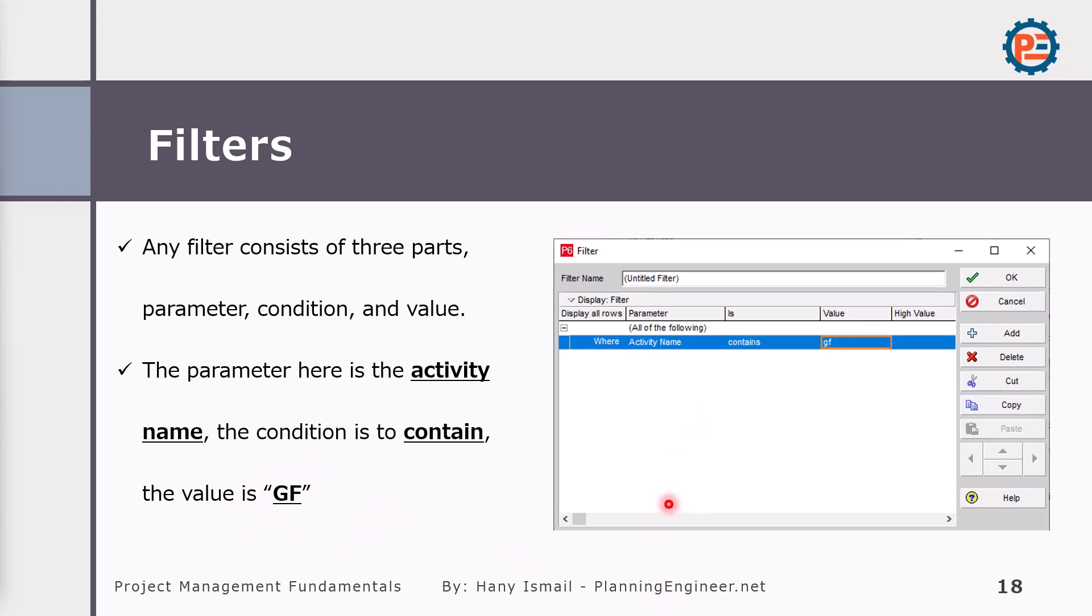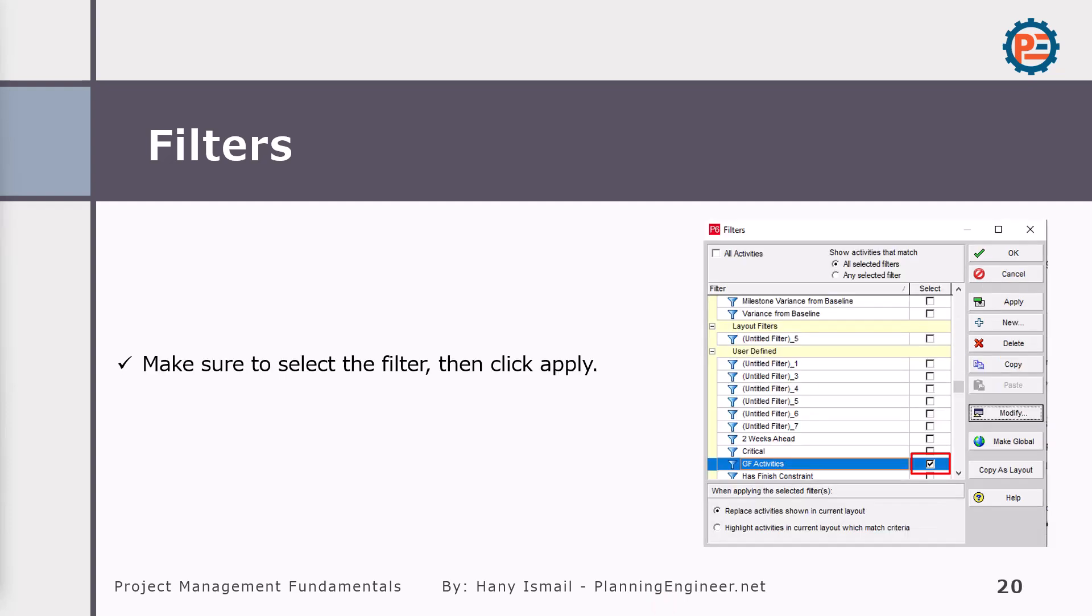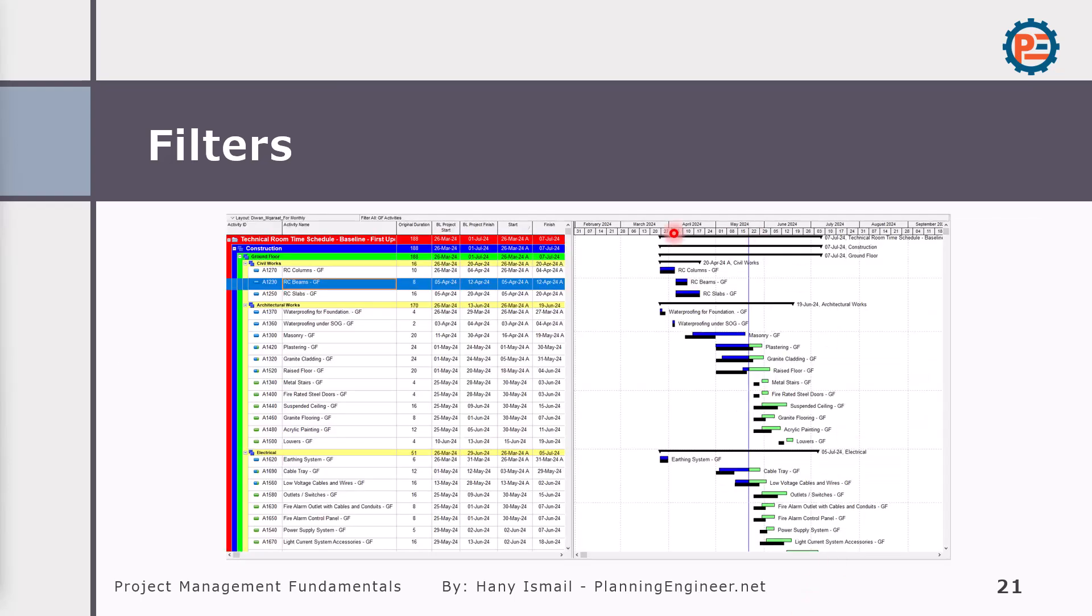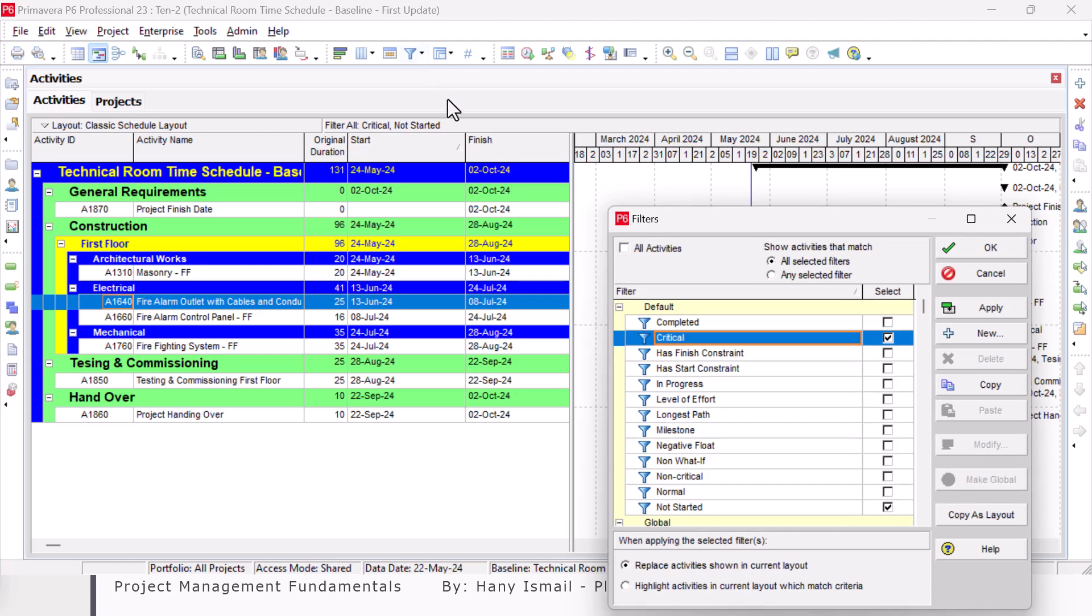In that case, what I'm going to do is create a new filter and choose the activity name that contains ground floor. Very simple. I will create a filter like this: Activity Name contains GF. Then I can name it as Ground Floor Activities, save it for later on if I would like to use it again. Then I can make the filter like this, so it will show me the ground floor activities.